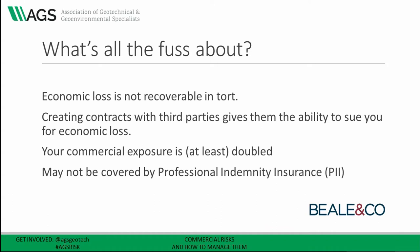In each case, signing a collateral warranty, writing a letter giving someone permission to rely on your report, or in some other way assigning — meaning transferring — the benefit of a report to a third party creates a contract with that person, and thereby gives them the ability to sue you for economic loss. Granting a collateral warranty, even if carefully drafted, will usually at least double your exposure to risk.